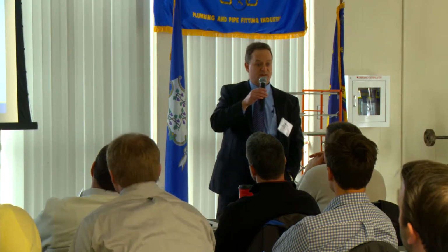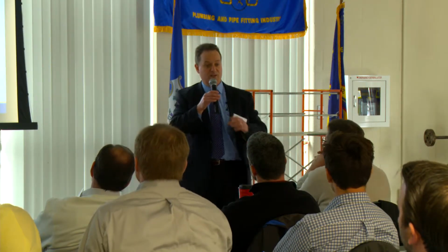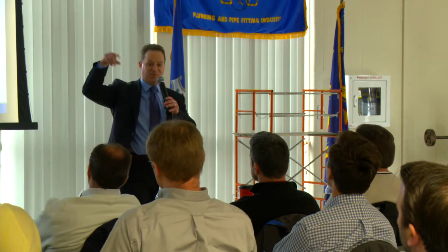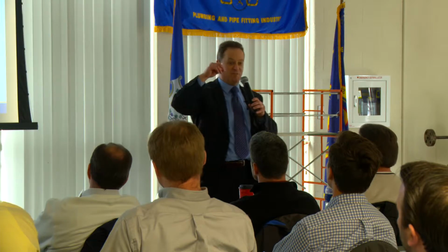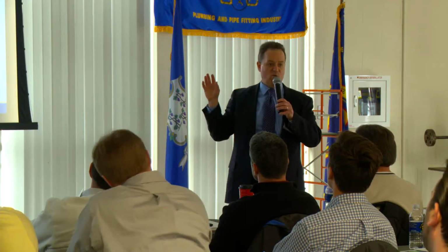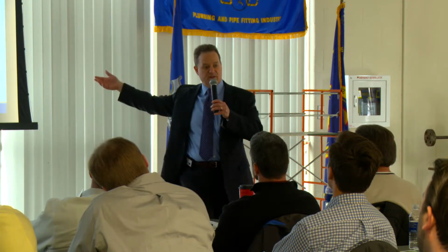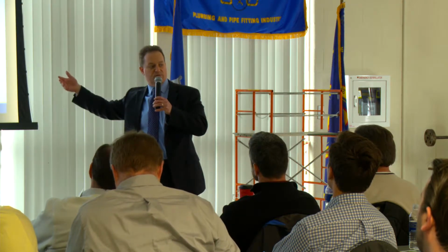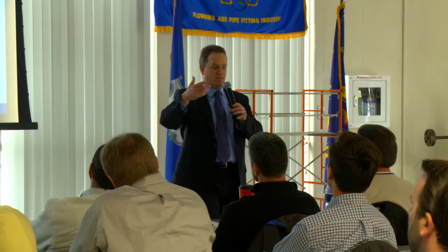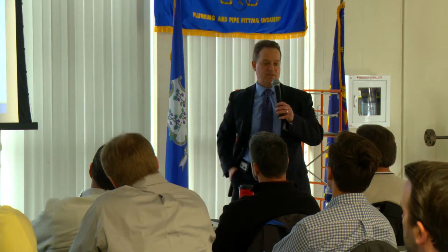What an obvious second scenario may be, after viewing that, is to take some of those 10-year life ones that the owner views as not directly critical, and take them out of the equation. Rerun the scenario and see how that improves the cash flows. That sort of iterative analysis is really what this tool is designed to do.